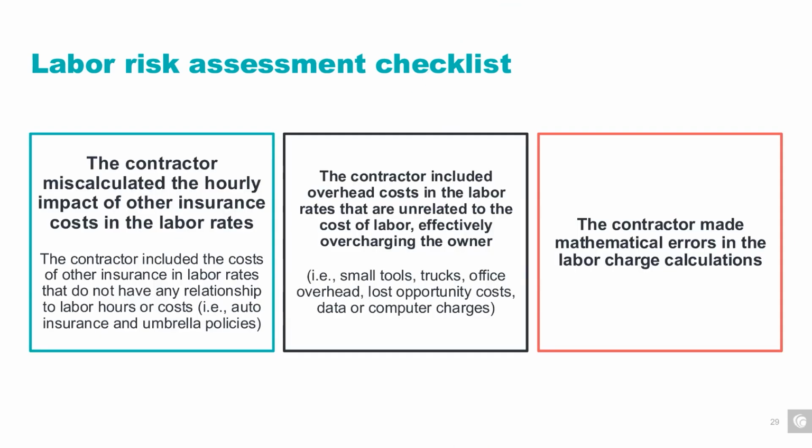Beyond taxes, other insurance costs can also be embedded in labor rates, even when they have no relationship to labor hours, such as auto insurance or umbrella policies. We also see overhead costs included in labor rates, such as small tools, trucks, office overhead, or even data charges. These are not direct labor costs and should not be billed this way.